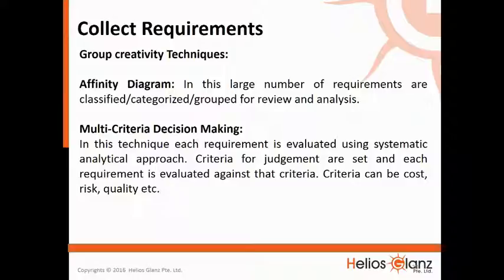Affinity diagram. In this, a large number of requirements are classified, categorized and grouped for review and analysis. Multi-criteria decision analysis. In this technique, each requirement is evaluated using a systematic analytical approach. Criteria for judgment are set and each requirement is evaluated against those criteria. Criteria can be cost, risk, quality, etc.